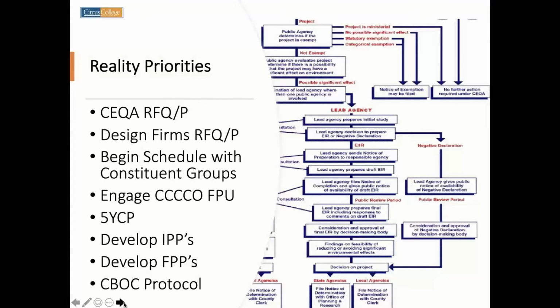So on our side, I mentioned 3 that will obviously be done on the FPP side. Those are ones where we engaged another consultant to do a study for us, and they looked at the point system that goes into calculating how many points you will get on a project, and the results came back that our 3 main projects tally very high. There is a very, very high probability that we would get state funding on those.